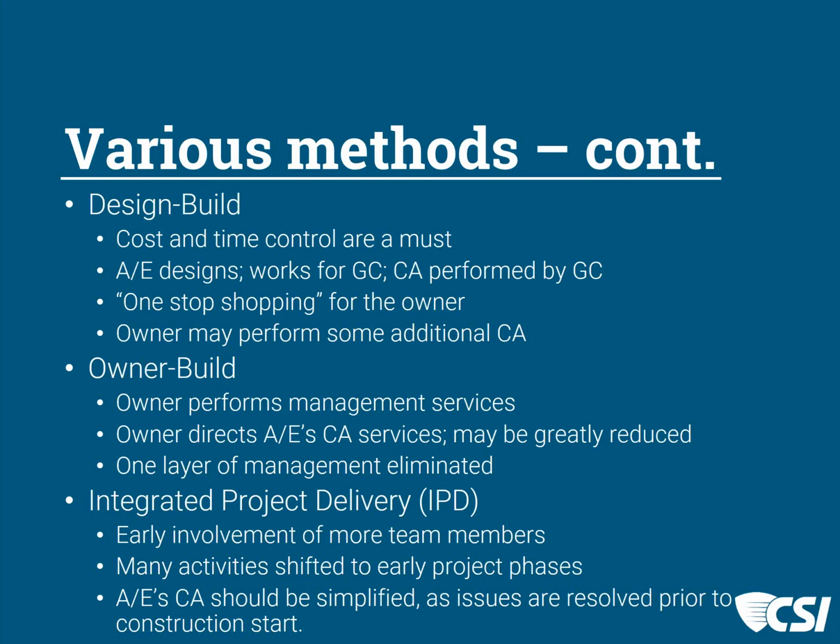And many of the activities in the typical project phase are moved earlier in the process, so that there's an opportunity for fewer coordination problems, for fewer changes that are contemplated later. Our role in construction administration can be greatly simplified because a lot of the things that we may typically find in the construction phase are being resolved much earlier.